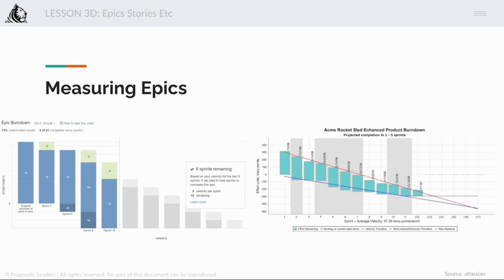Okay, if you're following Scrum, in Kanban there is no such concept directly, and that's why Kanban should be on top of Scrum and should not be used individually. It should not be used on its own. Okay. So coming back to this, scope creep or a new requirement should be added to the epic and not directly to the sprint. Okay. As the team moves through the project, the product owner may decide to take on or remove work based on what they are learning. The epic and release burn down charts keep everyone aware of the ebb and flow of work inside the epic and version.